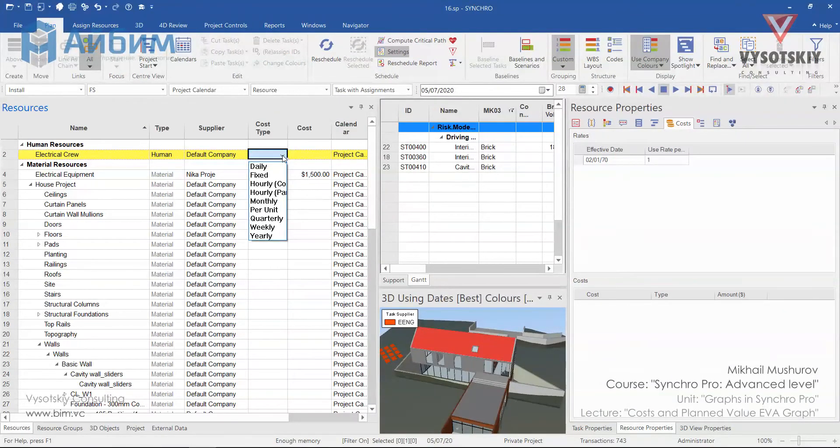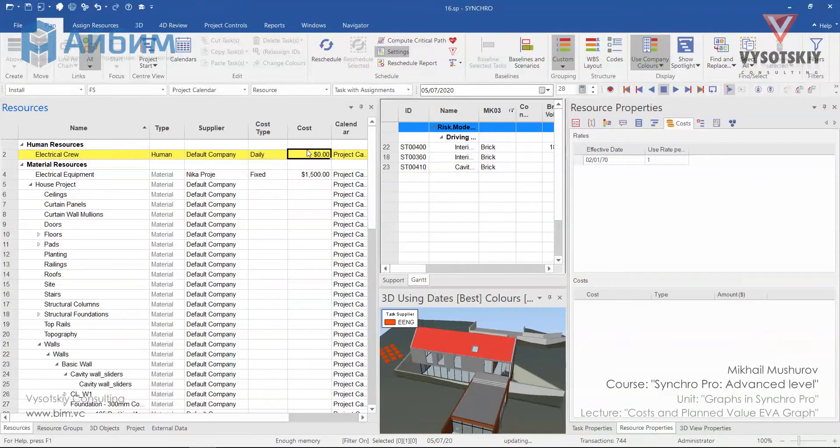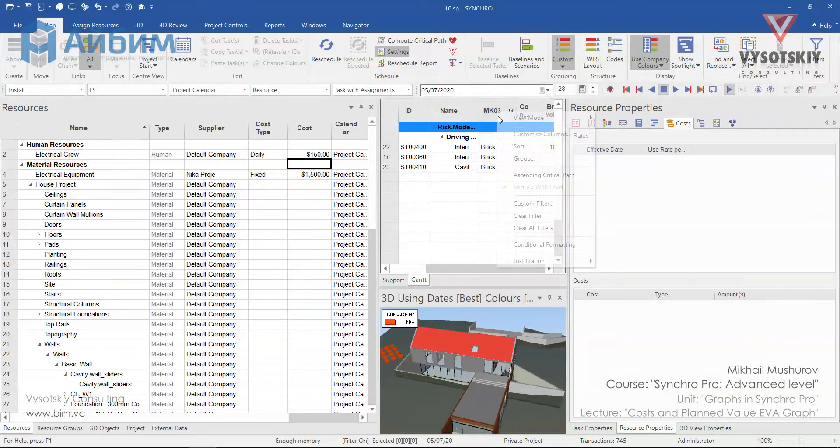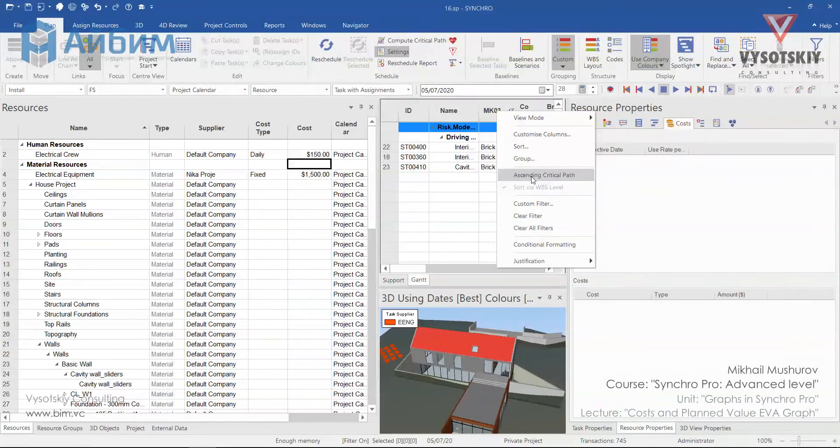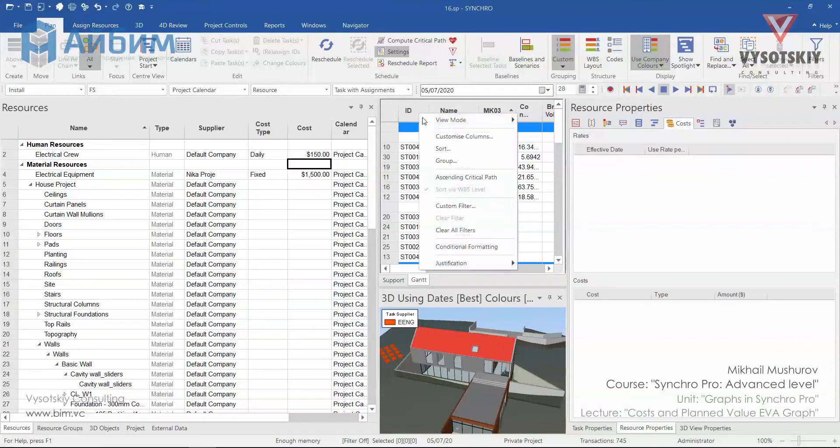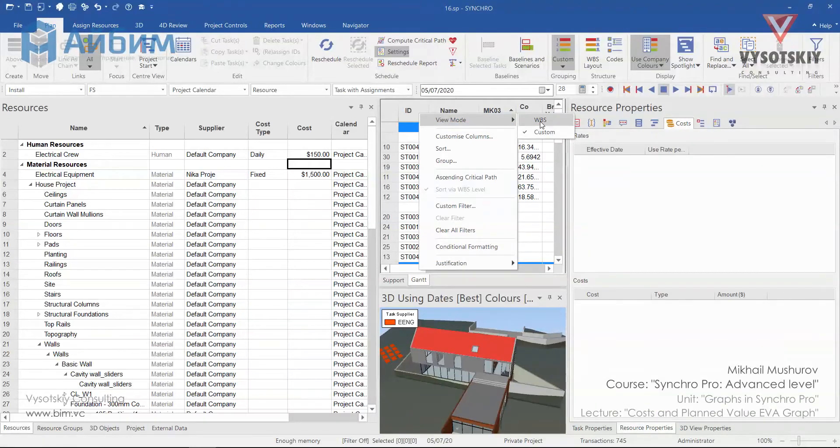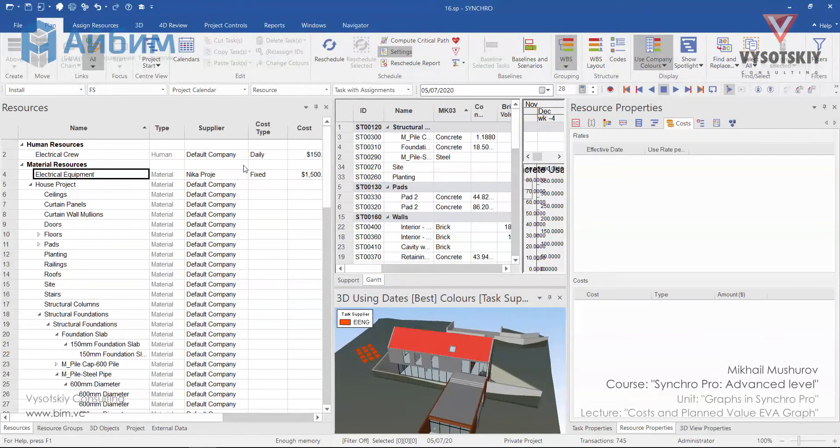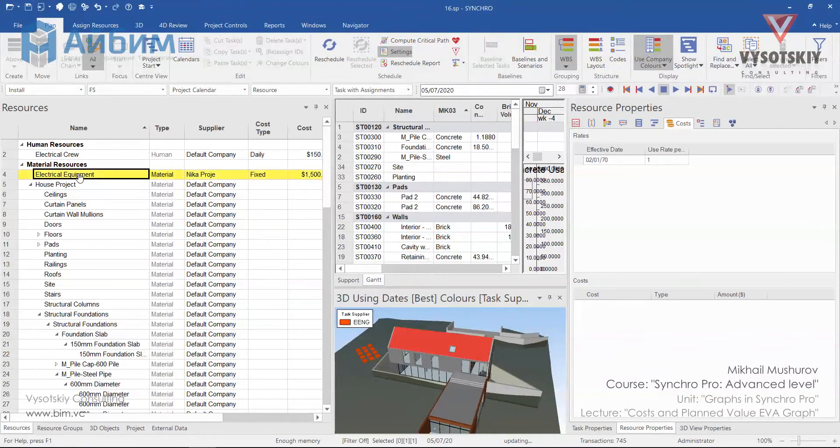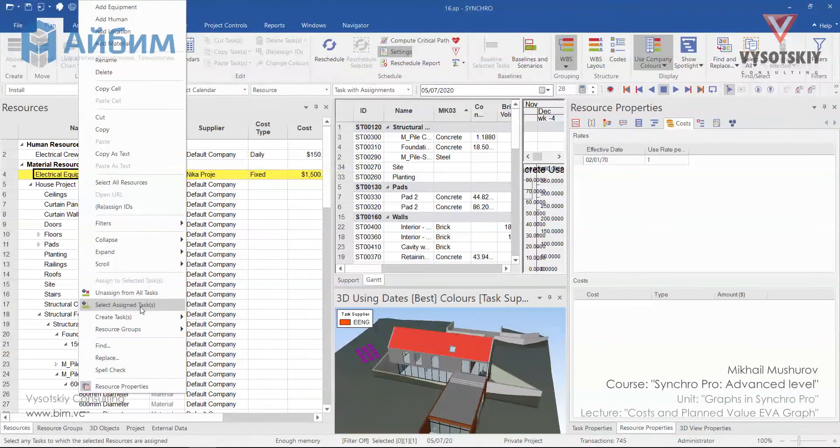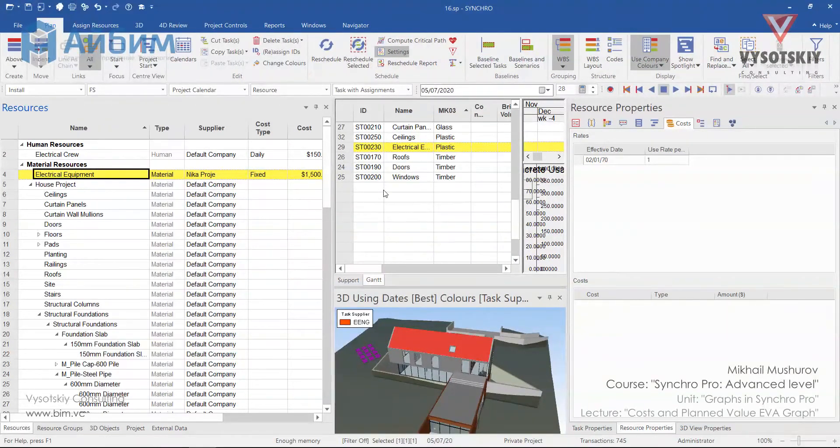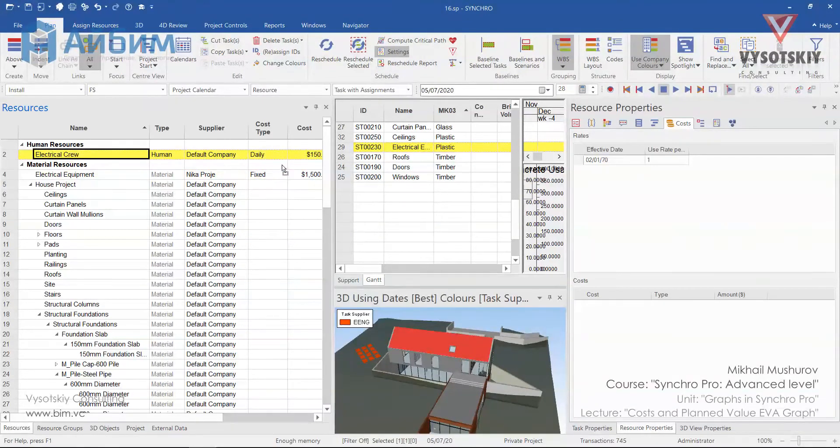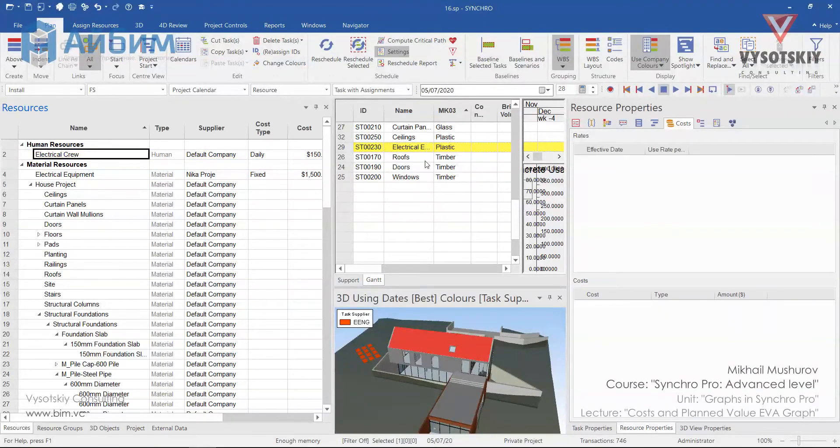Electrical crew will earn 150 dollars daily. Let's clear all filters from GAN chart and change view mode to VBS. Let's highlight the electrical equipment task. Right click, select assign tasks. Electrical crew human resource to this activity. Simply drag it and drop it over it.